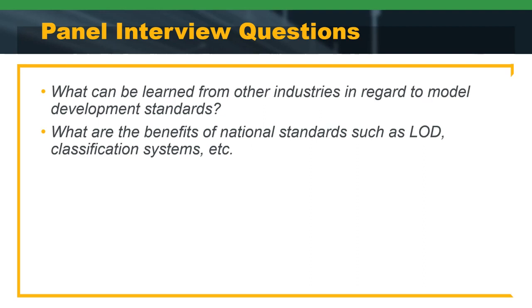What's your take from an agency perspective? Well, currently our process is very PDF based, right? There are initiatives out around asset collection or digital as-built. But when you start getting into model delivery, the contractors currently are responsible for the PDF process. But when we're looking at asset collection during construction for some of our assets, one of the things we're looking at is having our CE&I forces do that data capture. Similarly, I think Alan was alluding to that earlier. Just because that gives us back control over how it's collected and the accuracy and the standardization. So that's where we're headed.